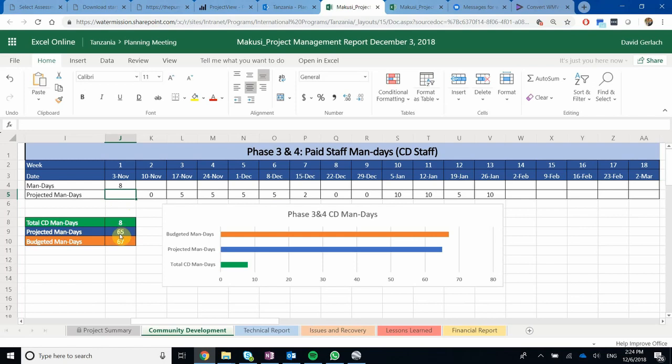And then it adds up all of the other man days and says, okay, according to this schedule that we know, we're actually now 2 days under budget, which is great, except now that we went in a little bit late, I may say, okay, well, that means we're actually going to have to stay an extra 2 days on that next week. As you can see here, now that I've changed these 2, it goes back and we're still just on schedule the way that we thought we were going to be.